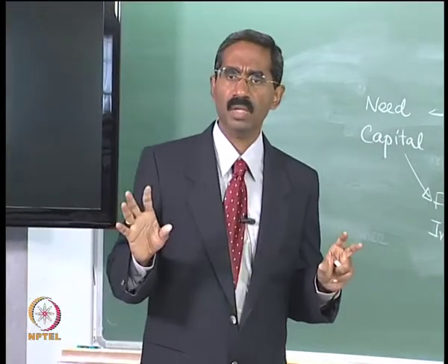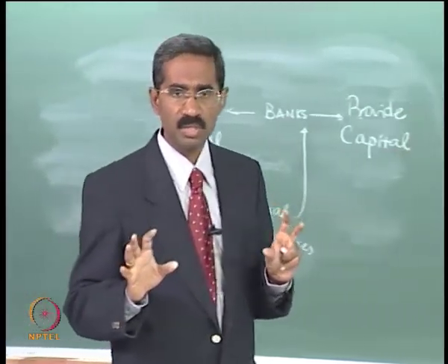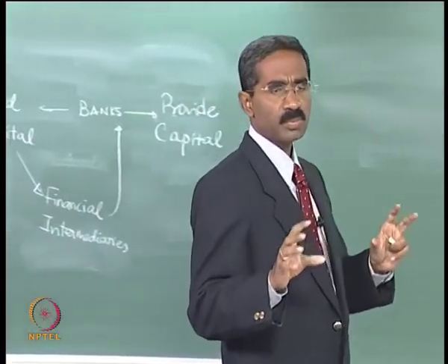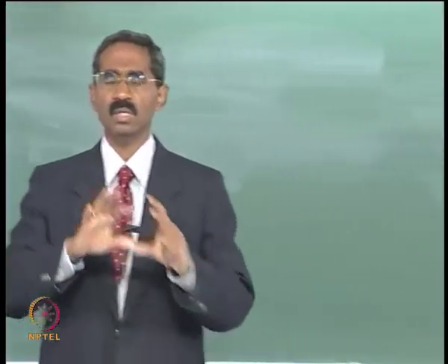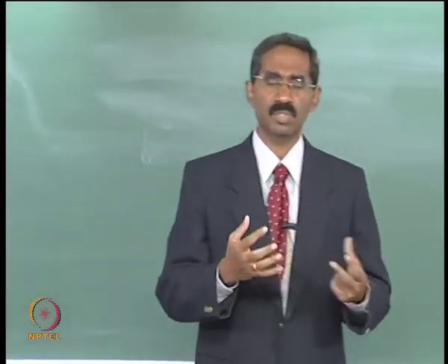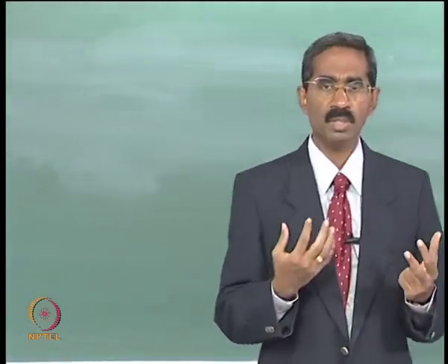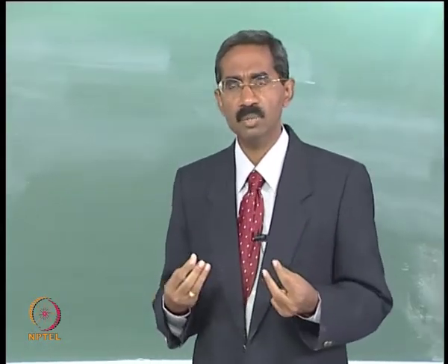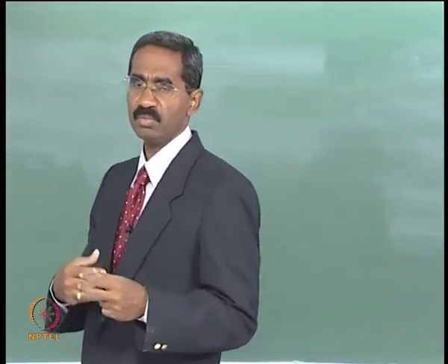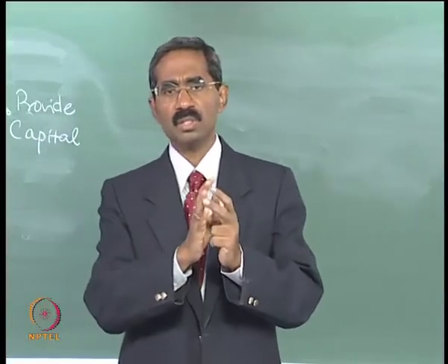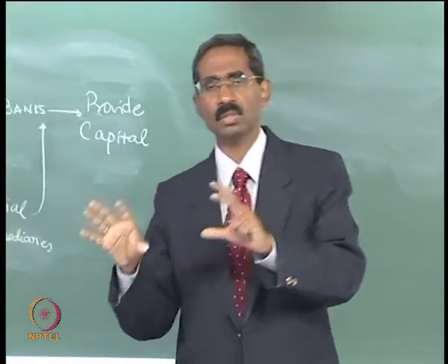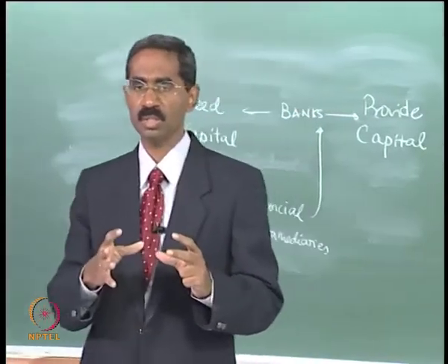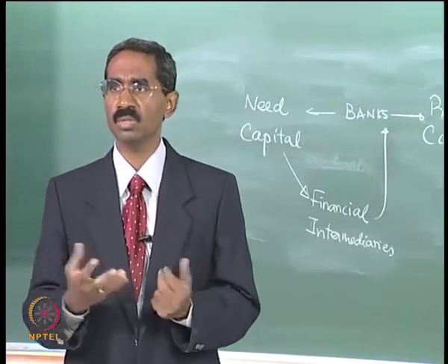And then, most importantly, before the project is actually taken to the lenders, we need to have a business plan for the project. The business plan will provide details in terms of what the expected revenues are, when the revenues are expected to occur, and how much the revenues are expected to grow. It will also talk about what the expected costs are going to be like, and what the profitability of the project is over the years. In essence, it talks about the sources of revenues, the profitability, and various other features in terms of how the capital is going to be utilized, and so on and so forth.